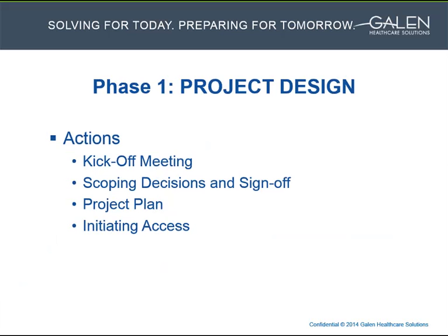The first phase is the project design. The conversion project begins with a client kickoff meeting to review the details of the items and scope for the project. The review provides the opportunity to ask questions and make clarifications so all parties can sign off on the plan of the conversion.